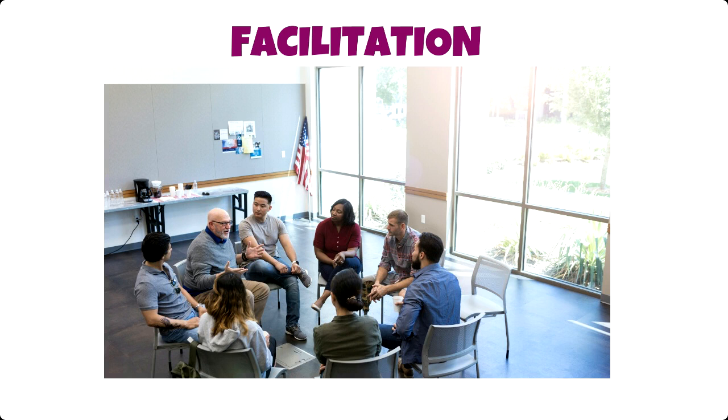So thinking about facilitation is really, really important. There are a couple of important principles, or just general facilitation principles, for when you're thinking about facilitating a retro. So the first facilitation principle is that as the facilitator of a retrospective, you want to be neutral. So every retrospective needs to have a neutral facilitator.